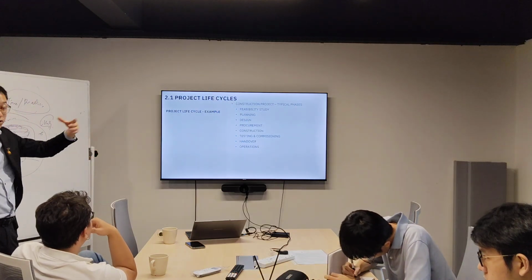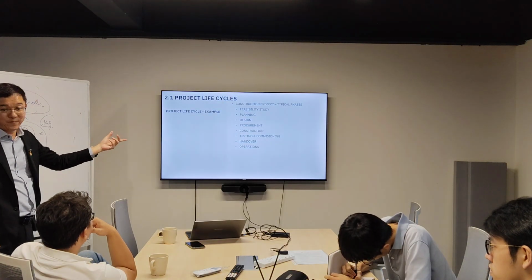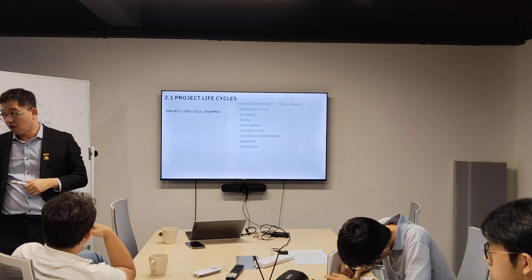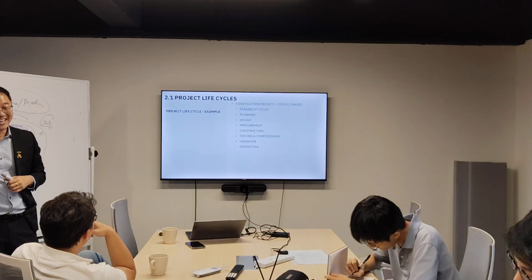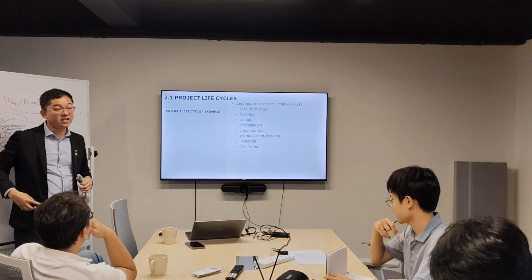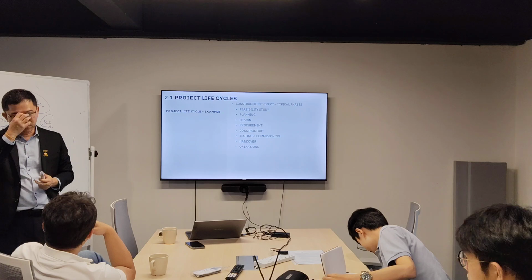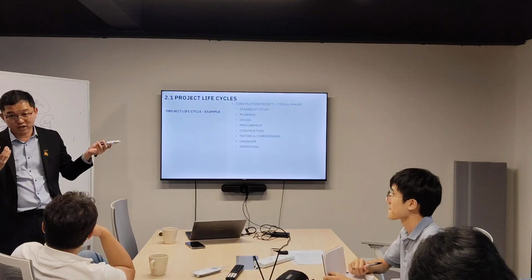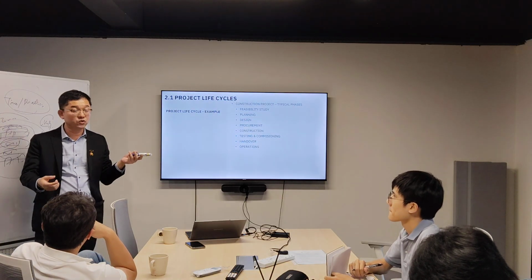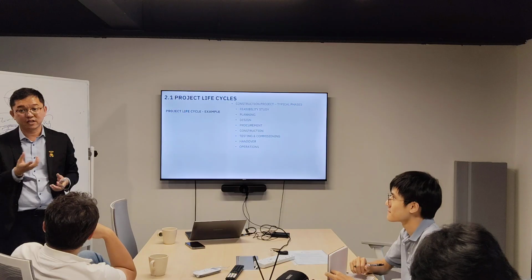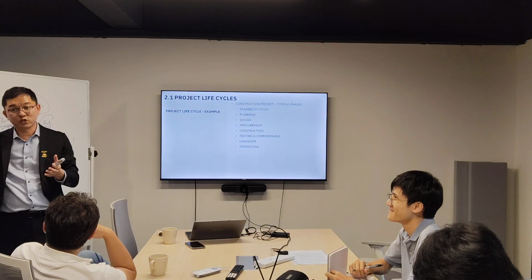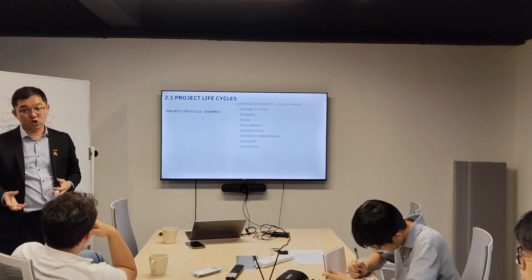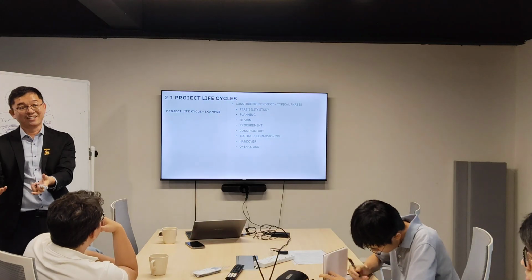And then after you procure already, there's a construction line. After you do all the construction already, you need to do testing and commissioning, or else your house has no water. There's a water connection to your house, and then you test it. If you do not do testing and commissioning on the toilet flushing, then later when you use the toilet, the waste cannot come out, and so it cannot go into the sewage treatment plant. After the whole process, you only then hand over to your purchaser.